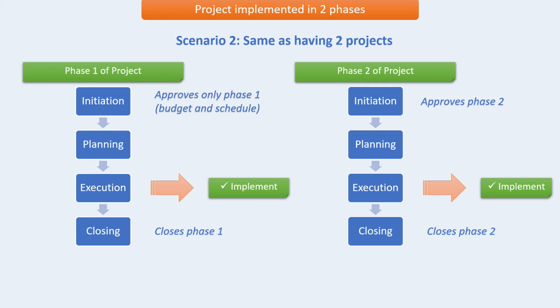So you hear that a lot in a project, we will do this in phase two, which is a polite way to say, no way we are doing this now. We hear what you want, but it will be too big to do it now. This is what I have in my example next. At the beginning of the project, someone wants to implement something too big that scares people a little bit, and they say, oh, we will do that part in phase two. So this way, phase one is a little bit more achievable, and we know what we're doing, and after we can stop and reflect and see if we can get the money for phase two.